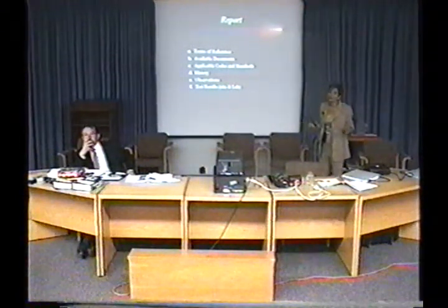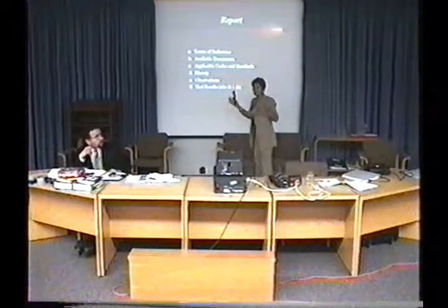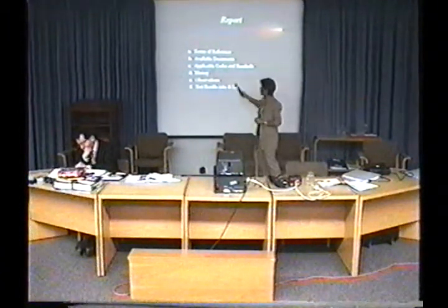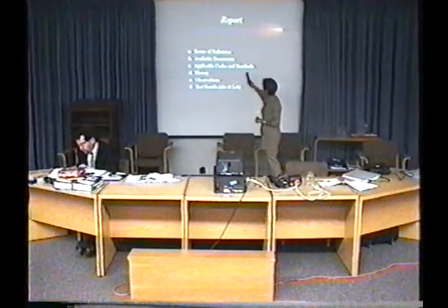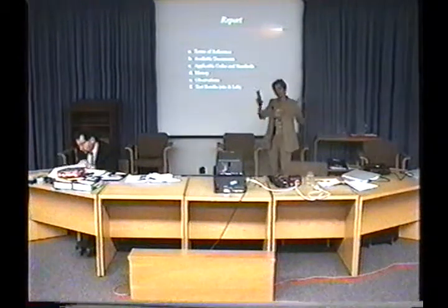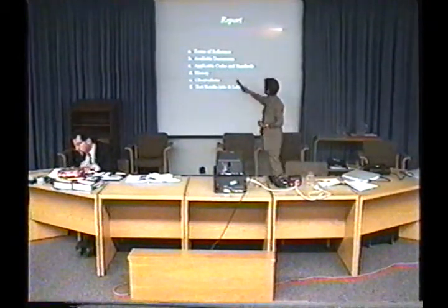A standard report, when we prepare for court or as an expert report, we try to have the terms of reference, so it establishes what was the criteria that we were looking at, what was the available document, what did they give us, and what they decided not to give us. What are the standards and codes that apply to what we are looking at?